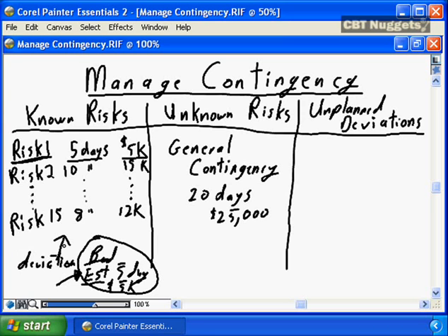That is totally unrelated to risk. You need to reserve each individual risk event, risk 1 through risk 15, the time allocated to each risk event independently, and only consume that time, those dollars associated with that risk event, when in fact the events around risk number 1 have happened. It's 3 months into your project, and you have in fact determined that risk number 1 has happened, and you deploy the time or you deploy the dollars, or better case, the risk has not happened and therefore you have extra funds available.